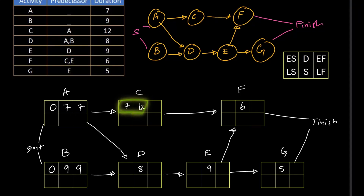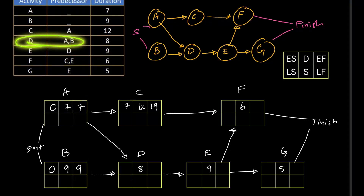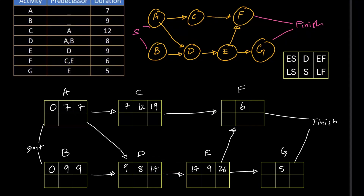We add the early start of C and its duration: 7 plus 12 equals 19. For D we have two options — early finishes of 9 and 7. Since D starts after the completion of both A and B, we take the largest number, which is 9. Adding duration: 9 plus 8 equals 17. This 17 goes to D's early finish box. Then E's early start is 17, and the sum is 17 plus 9 equals 26.